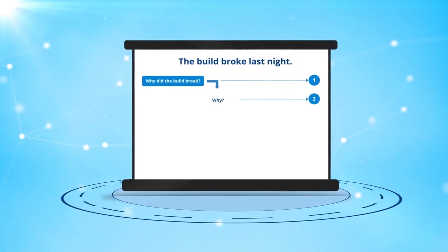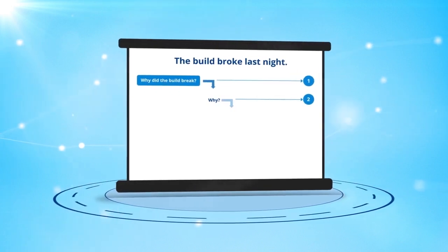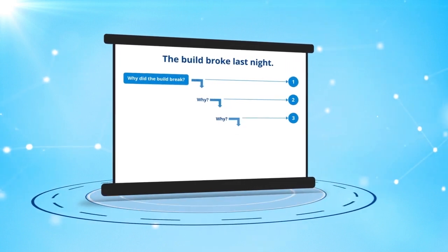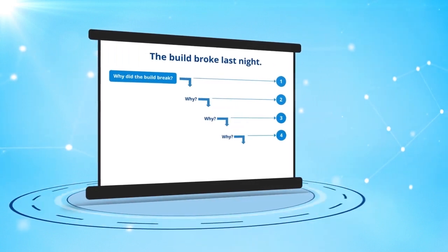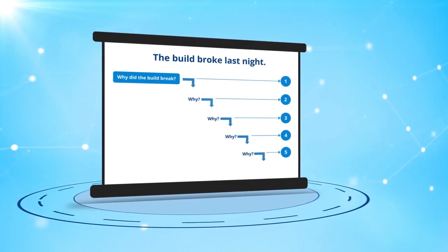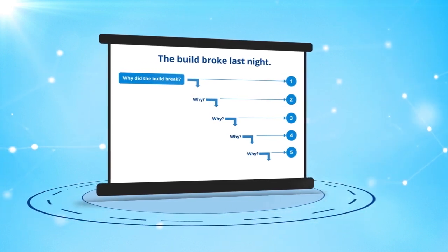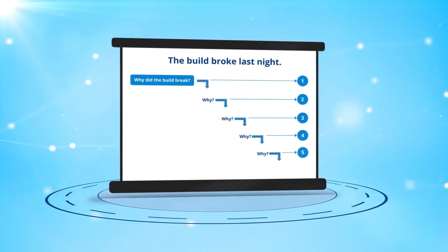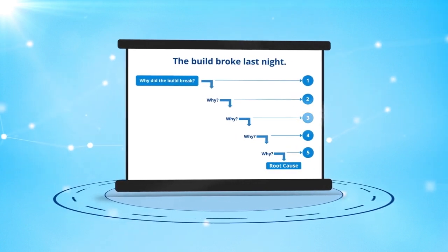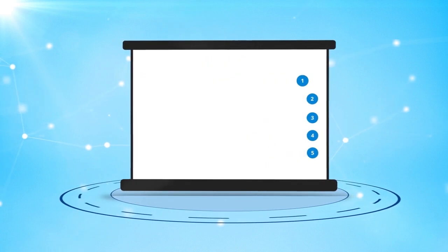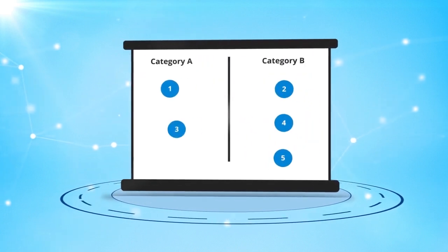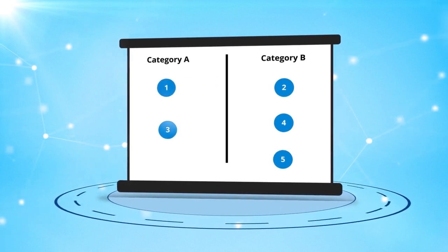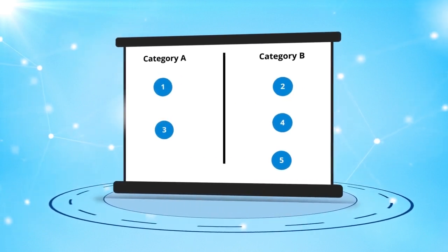We'll discuss number 2, put the one that seems the most common on the board, and then individually answer why number 2 happened, and so on, until we get to number 5. Whatever it is, at the end, we want to come up with 5 different answers for why, and drill down into and try to find the root cause for why number 1 happened. We'll characterize the chain of responses, and then we'll discuss and consolidate the chains into a single chain that we all agree is probably the most likely.